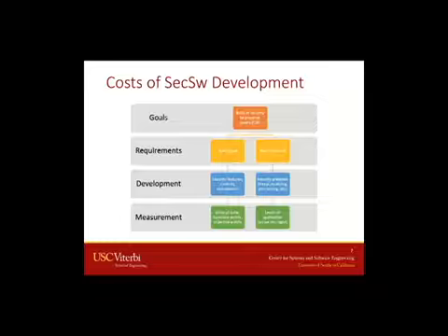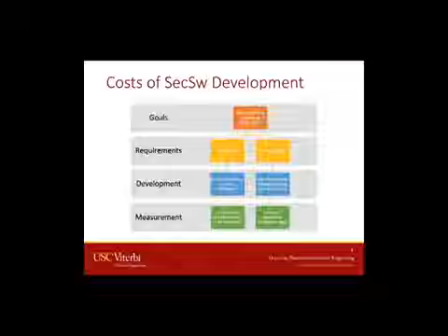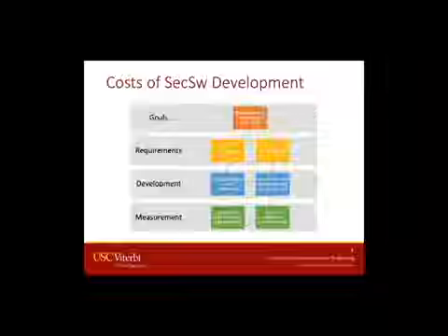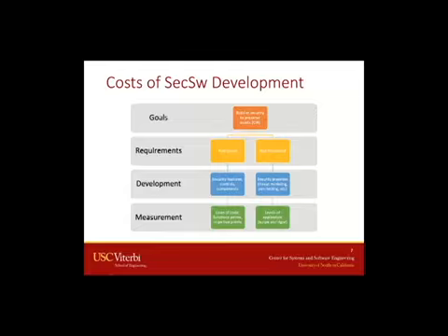But for all the effort that, for example, people need to inspect the code or inspect other artifacts of the project, this is the non-functional component. This is the effort for the team to conduct these tasks, to execute all these practices that are not dependent on the security features. They need to be done despite the number of security features or controls that are implemented.